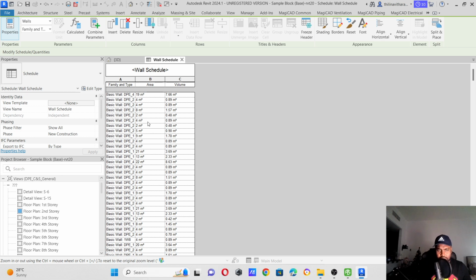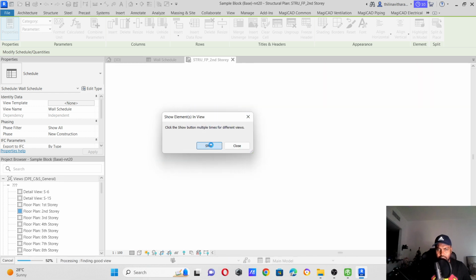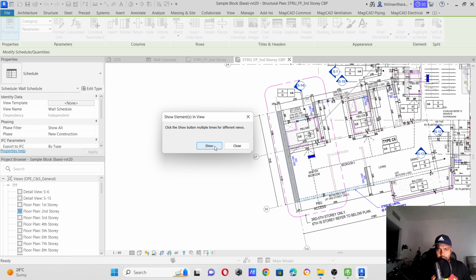You can have a basic quantity in this whole schedule. Of course, you can filter these quantities and you can revisit and check these quantities with your model, and you will have a few features. But is this enough? I don't think so. This is not enough. You need grid references for your quantities. You need to measure these quantities according to the measurement rule.